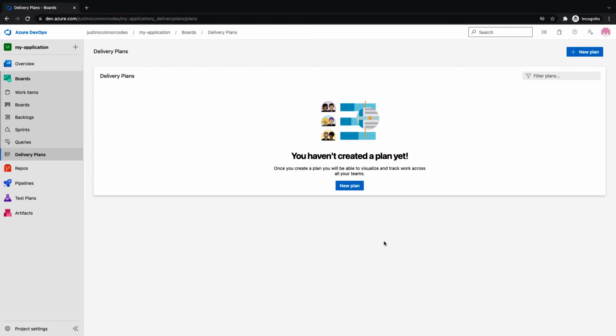And the other thing is delivery plans. This is more used for executive views of maybe feature roadmaps and how something's going to be developed more long term. Some teams will use the idea of a program increment, so maybe a 6-week bucket containing 3 sprints of work, and organize features around that so that we can communicate those on a quarterly basis. So this is where you start to bridge that gap between Agile and Waterfall in a way that doesn't break your Agile development process, still communicates everything, and because at the local level where you're delivering those stories, you're being accurate and consistent and reliable, people trust your plans and are more willing to move from a waterfall mindset to an agile mindset.